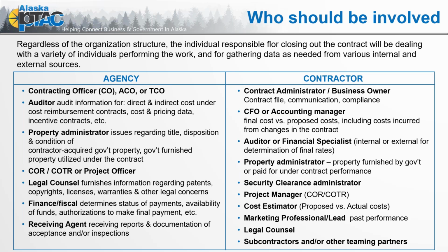And so when we're talking about that government furnished property, equipment, so for example, if you're providing or have provided, your contract is now complete, that you had a help desk, an IT help desk, and they were on site, so they were using government furnished equipment, computers, maybe even desks, office space. So all of that was listed in the contract as that government furnished equipment, and therefore should be inventoried at the start of the contract, and you have someone that is responsible for maintaining. And then of course, as the contract is closed out, you now have that inventory to compare against.